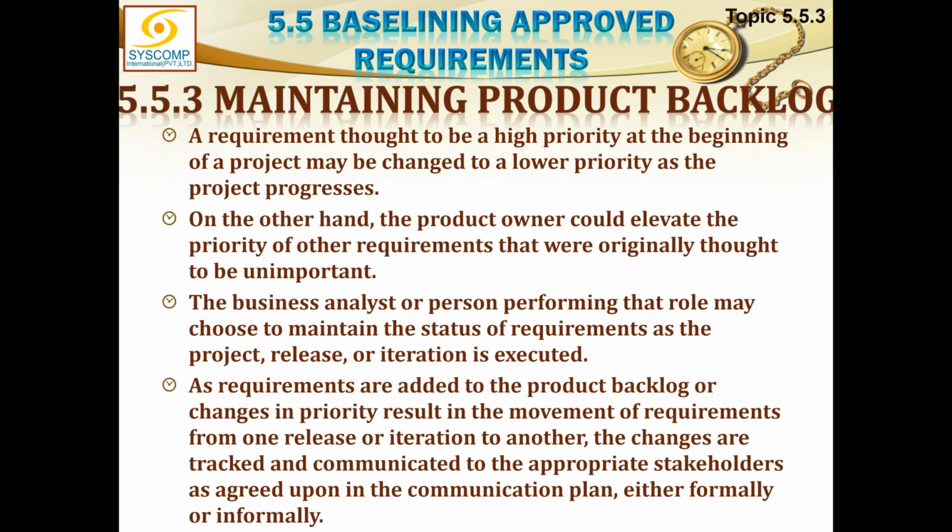On the other hand, the product owner could elevate the priority of other requirements that were originally thought to be unimportant. The business analyst, or the person performing that role, may choose to maintain the status of requirements as the project release iteration is executed. As requirements are added to the product backlog, changes in priority result in the movement of requirements from one release or iteration to another.